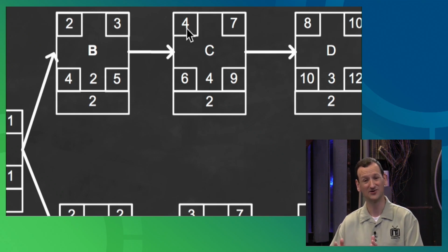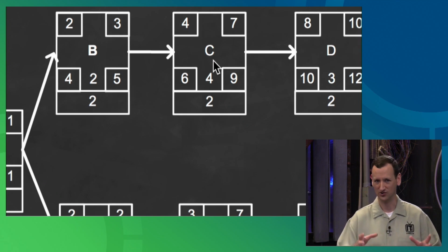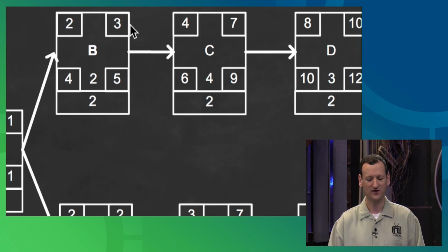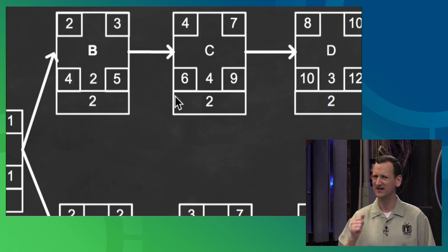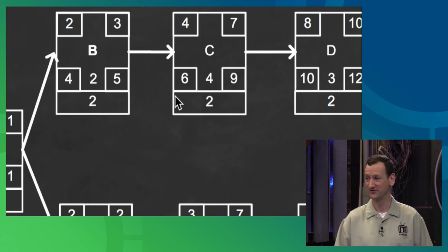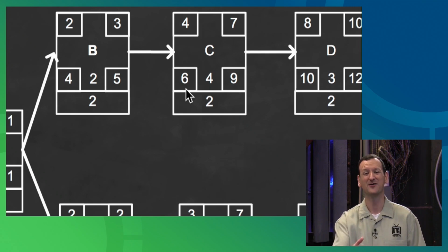No. It now starts on the 6th, all right? And we know that's okay. It can start on the 6th and we'll still finish on time, but this one just got bumped back 2 days. What if I had contractors scheduled to be here on the 4th and this one falls behind and now I tell the contractors, hey, can you come out on the 6th instead? And they say, no, I'm sorry, we're booked for another job, right? Well, this task could have started on the 6th and I'd finish on time, but now I don't have contractors. Now I've got a problem, all right?